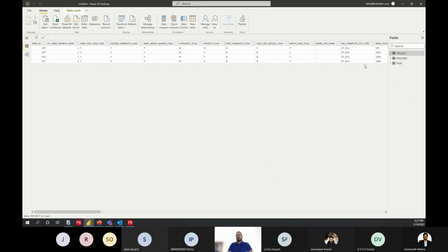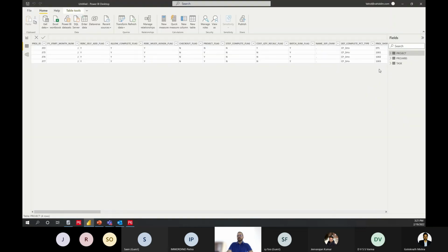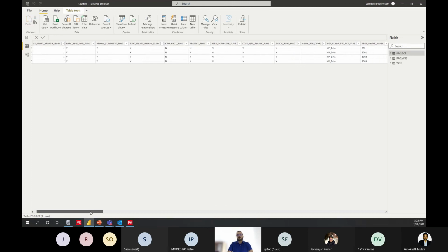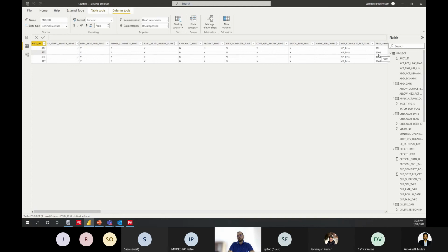But what happened? Because in here you can't see that, but here you can see it, because all the information is in the database. The only thing changed is the WBS original project ID. As you can see here, 1003 now has the original project ID, which means this project is not the current project, but the baseline of this ID. So 375 is this project, line 2, which is the 1001. So we made this project a baseline of this one.